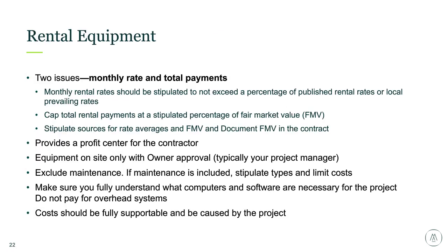Rental equipment is another high-risk area, specifically contractor-owned rental equipment. However, third-party rentals can pose a risk if the rental charges are in excess of the actual cost of the equipment. That is, if it's a 3-year project and they need a specific equipment for the whole time, it might make more sense for you to buy it. Equipment needs should be well understood, and a cost-benefit analysis should be performed to ensure you're not paying someone else to purchase and keep the asset.